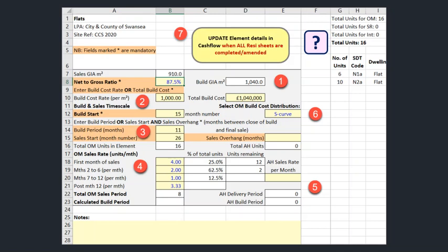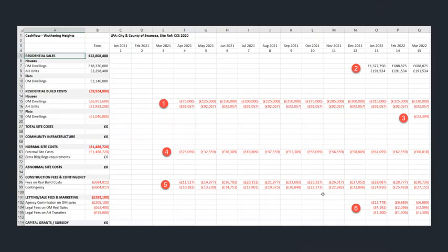Lastly, having completed all mandatory fields on both Resi Element worksheets, I save the file, as I have before, prior to clicking the Update button at the top of the page. This button tells the DVM to transfer all the data from the Resi Elements to the cash flow. When I do that, the DVM automatically takes me to the cash flow worksheet, where I can check that the data has been transferred in the way I was expecting.